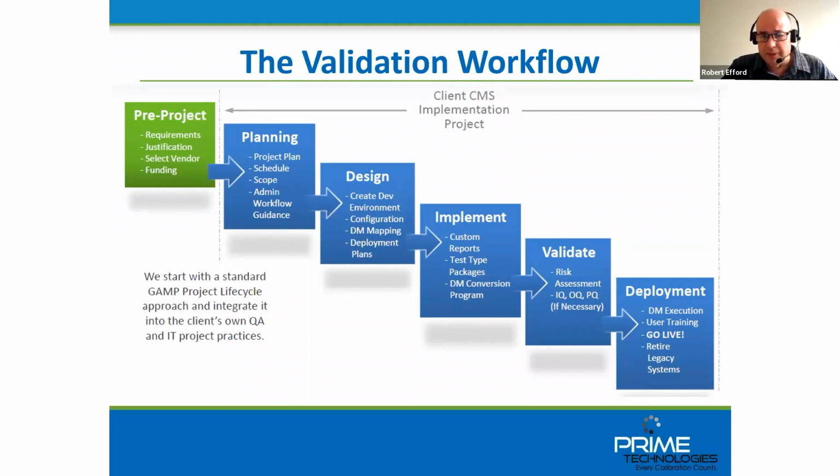Next, we go to the validation part of it, and this is where we get to the risk assessment. At this point, we're going to decide at what level you may wish to do your testing, and that risk assessment is going to define your installation qualification, your operational qualification, your performance qualification. Sometimes these will be combined into an OPQ, an operation performance qualification.